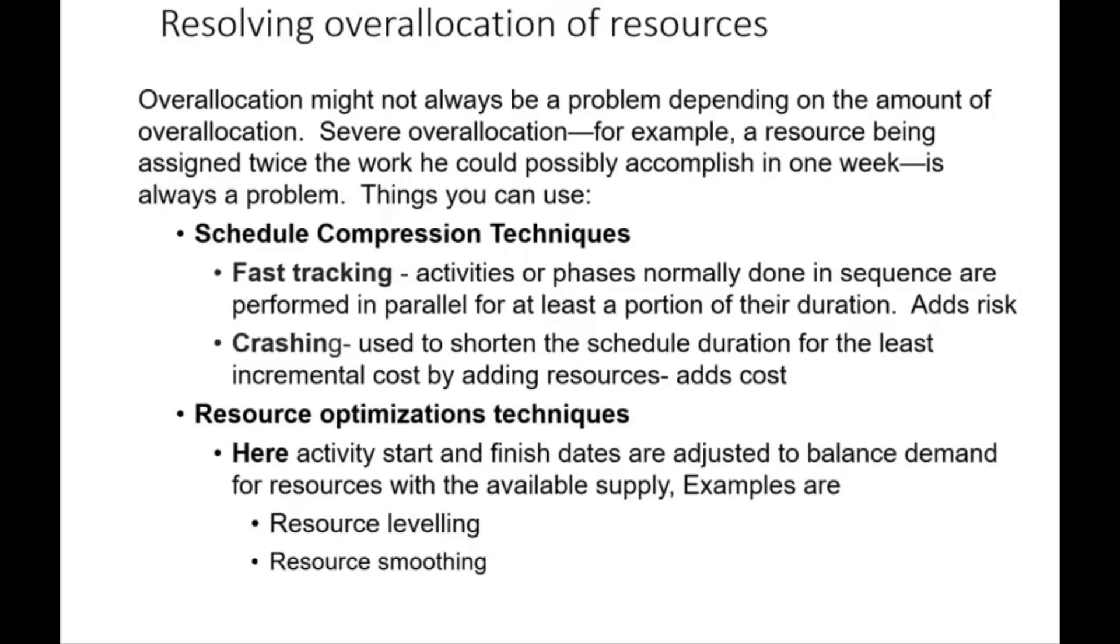You can use schedule compression techniques which include fast tracking, where activities or phases done in sequence are performed in parallel for at least a portion of their duration. I'll show you that when you get on to MS Project, but it adds risk. Crashing is used to shorten the schedule duration for the least incremental cost by adding resources, but it adds cost.